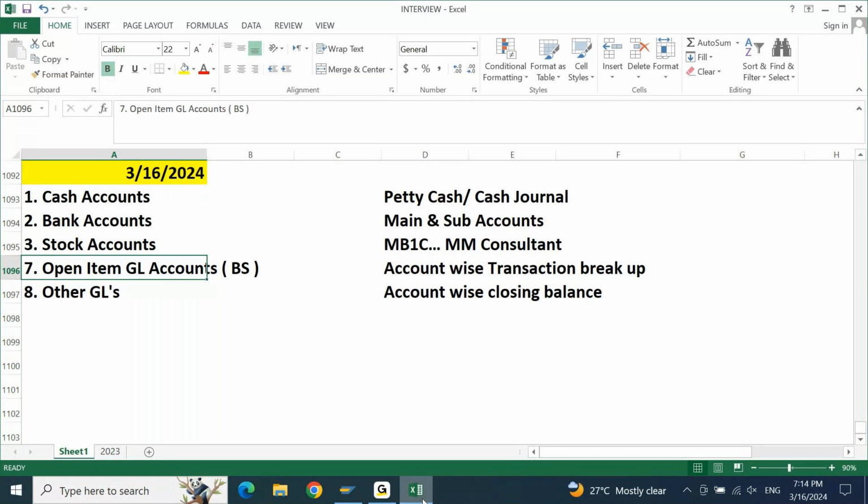is required, accordingly you will make a note of it and tell them this is what is pending, this is the current status of it, this is what we have done, this is what you need to do going forward. Accordingly, the other person, whosoever is taking over your position in the support, will say that okay, as per the KT sessions, everything is clear.